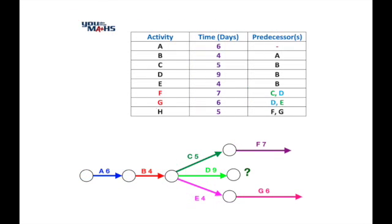Let's just recheck our present diagram. We can see that activity C is definitely a predecessor to activity F, and the same applies for G that activity E is a predecessor to it. The problem is activity D which basically belongs to both F and G.